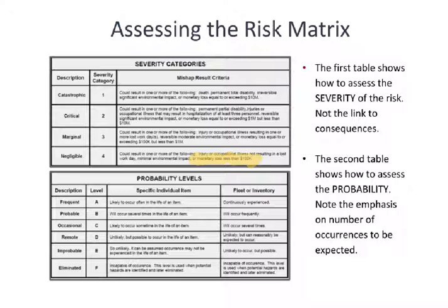So that part of this methodology you might want to reassess. My recommendation to you would be to think of this monetary value as something like, say, less than 5 to 10% of the project budget, of the total budgeted cost of the project.